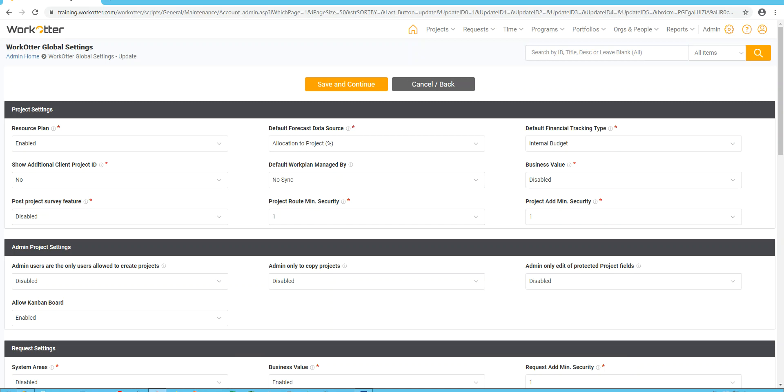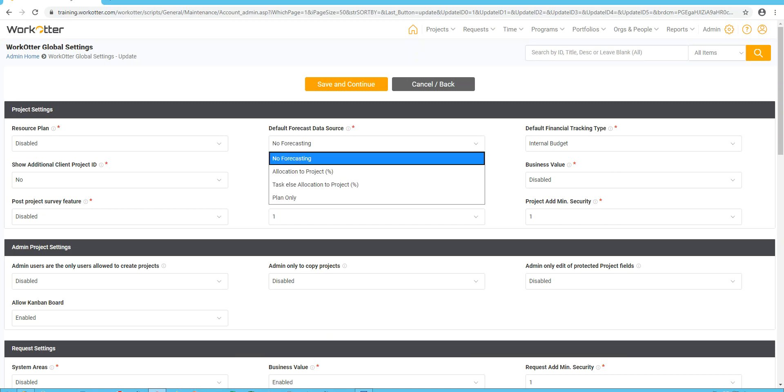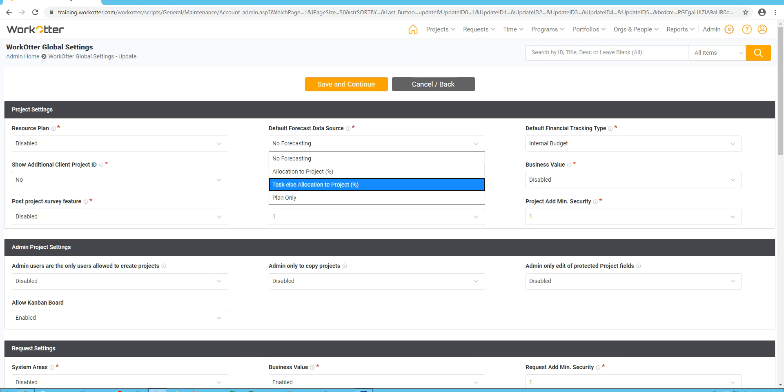Going through the project settings, the resource plan setting, we highly recommend you disable that. That is a deprecated feature in WorkOtter and it should be disabled when you first set it up. The default forecasting data source - within every project, the demand can be generated from a variety of places and this just sets the universe default. My personal favorite is task else allocation to project. What that means is if there's a plan, a detailed plan, the system will use that plan to build the forecast for that project. If there is no detailed plan, it will then look to see if you've allocated as a percentage of someone's time their participation on a team.